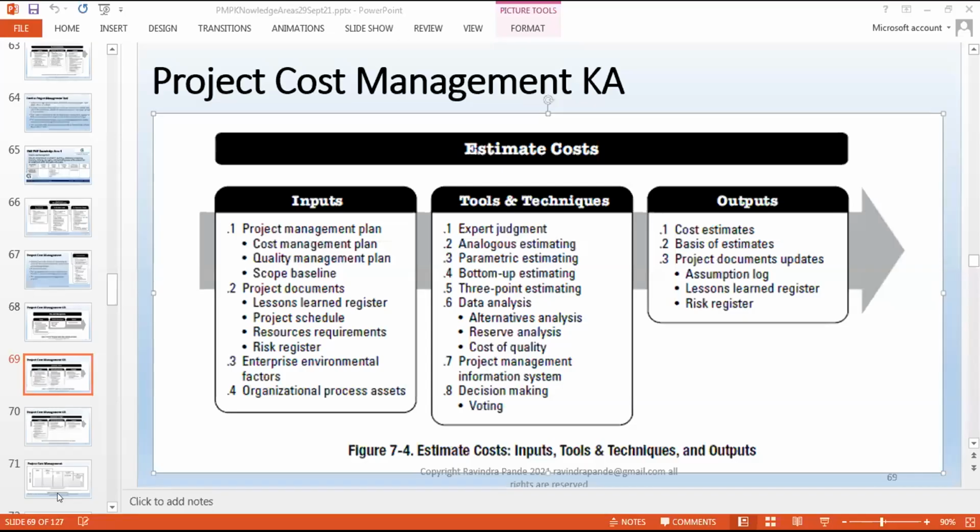And that's what we normally review in this cost estimation as well. So these costs have to be considered. This is what we talk about, the QA and QC, quality assurance and quality control type of cost. We will consider it, and we'll also add it to the estimation cost, because those types of efforts also need to be spent on a given execution, be it a product, project or solution, whatever you are developing.